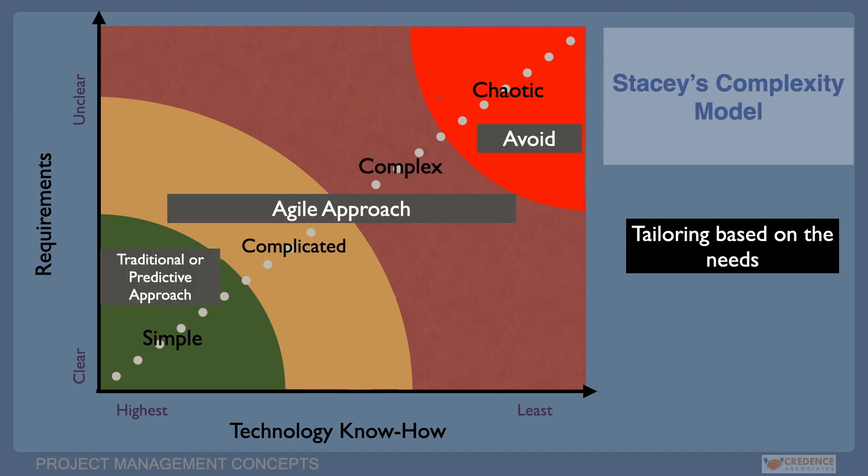We have seen Stacey Matrix in the context of development approach on the basis of what and how. When the project requirements are clear and technology is known, complexity is simple and traditional approach can be followed. If the requirements and technology are both unknown, this becomes chaotic and usually such projects are either avoided or converted to become complicated or complex. If the projects fall in the category of either complicated or complex agile methodologies, with or without tailoring can be applied.